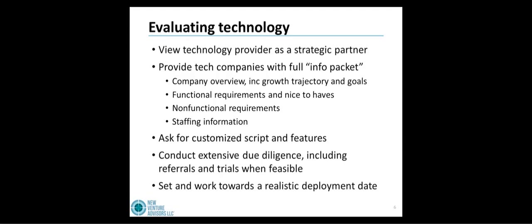And then finally, early on, really think through what is a realistic deployment date for the technology that you want to implement. Sometimes there might be a drop dead date by which you must have it out, before the preseason crop planning time frame for the next year. Otherwise, you're not going to be able to implement it because things get too busy or your growers aren't willing to. So really think through: are there drop dead dates, and is that drop dead date realistic? And in all communications, starting from the very get-go, make that really clear to the vendors you're working with. Engage them: is that feasible? How likely is it? Ask them to communicate what the big stumbling blocks are that often prevent the deployment timeline from being met. How can you, as a food hub, address those proactively? How can the vendor address them proactively? And I think this really allows you and the vendor to start off with a strategic relationship rather than just a vendor relationship. So I think it's a really important point.